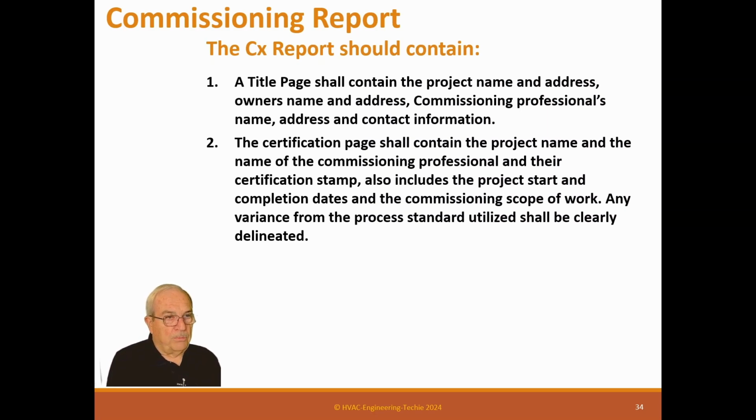Because what's really important in here is if you said you're doing this in compliance with the ANSI standard 110, and during this process, the owner asks you not to do something or to do something different, then you need to delineate that you did it differently in this certification page. So that if anybody comes along and says, well, you didn't actually follow standard 110, you can say, yes, I did, but it's clearly delineated. We were asked not to do this particular thing on this project.